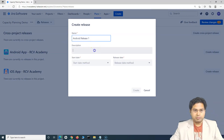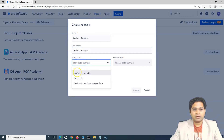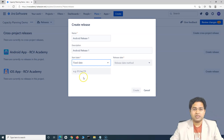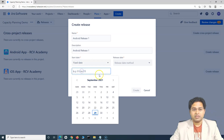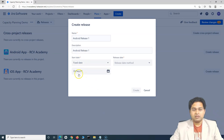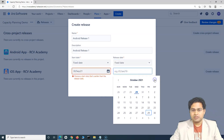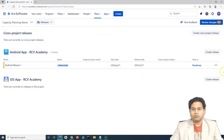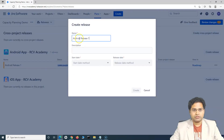Say for example this is 'Android Release 1'. In the start date you have different options: as early as possible, fixed date, or relative to previous release date. For example, if your company or project does quarterly or monthly releases, you can specify the release date. Say my release one needs to start from tomorrow with a fixed release date of 29th of October. That's how you create the release — the first release has been created.